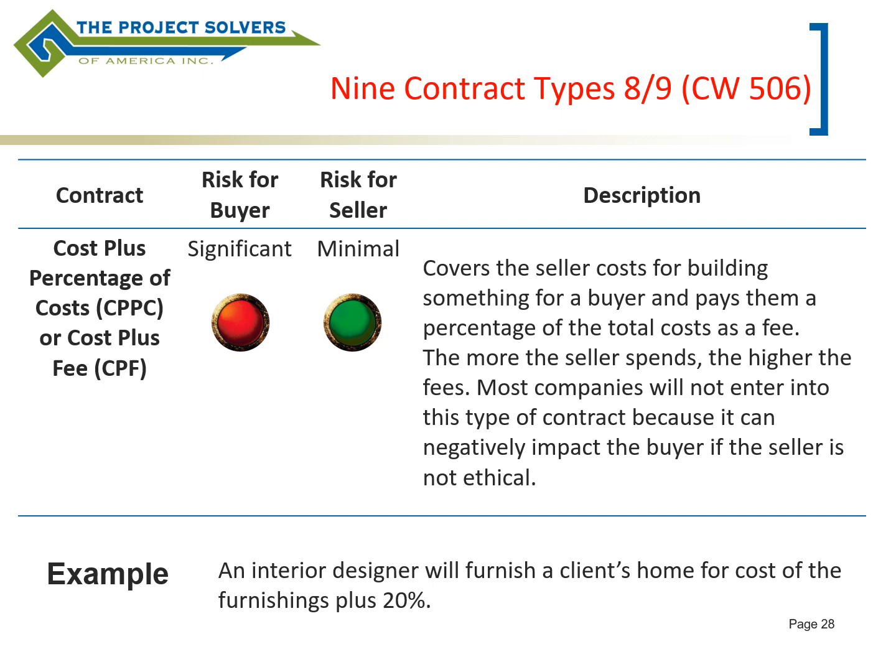The reason for that is because the seller is getting all of their costs paid for, plus they're getting a percentage of the costs as their profit or their fee. So the higher the costs, the higher the profit. Therefore, there's very little incentive to try to keep costs low, which could become a problem. And you might have ethical issues and so on.